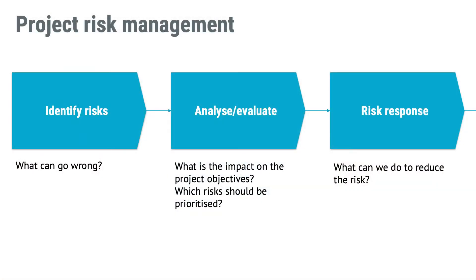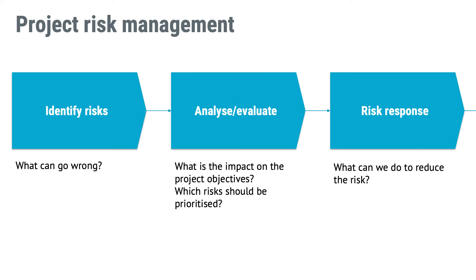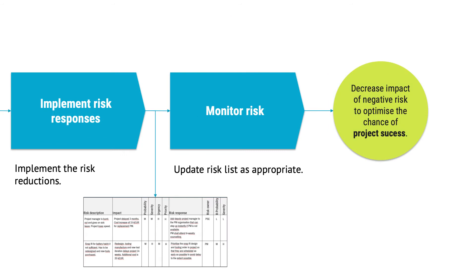The first thing to do is to identify the risks — that is, what could go wrong. Having identified what could go wrong, you should analyze and evaluate the risk to figure out what the impact might be and which ones to prioritize. Then figure out a response to the risk — what can you do to reduce it — and then implement the response. All of this is usually documented in tables similar to what's seen in this example, though obviously there would be a lot more rows than just two.